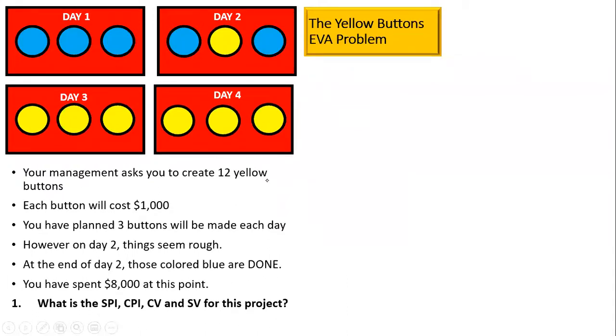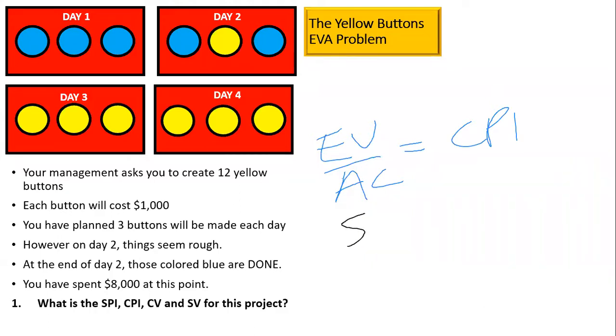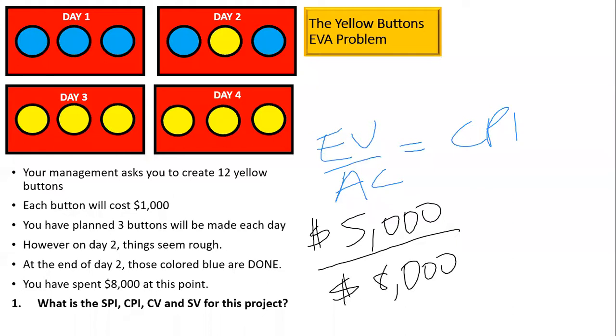So that's the picture. And we're going to say earned value divided by actual cost equals CPI. I hope I didn't get my wires crossed. If I did, I'm sorry. Sometimes it's just so much to say, you tend to get it muddled up. So anyway, we have 5,000. Remember, the dollar sign is always there in these indices, but the dollar signs cancel, okay?